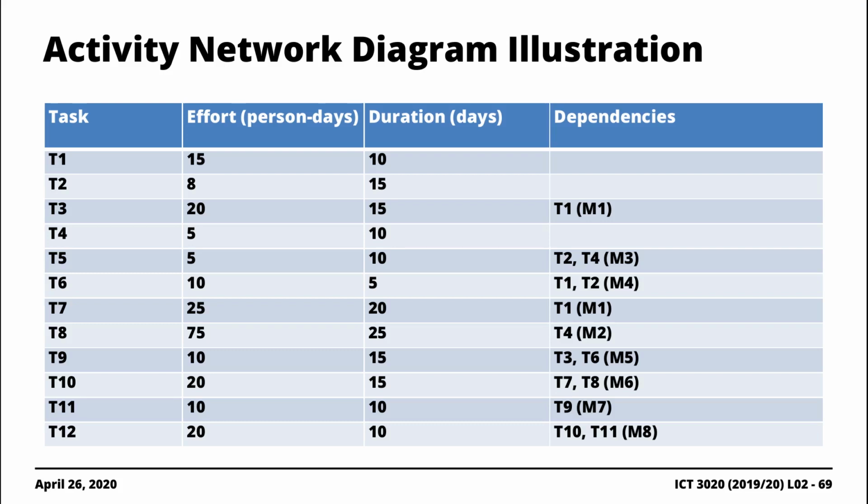So again, the input for the activity network is essentially your task IDs or the task names, the associated durations, and the dependencies that exist amongst the tasks. Remember that I mentioned that one of the very first things you're going to have to do is come up with the WBS or work breakdown structure. As you come up with the work breakdown structure, you come up with tasks, how long it's going to take for you to work on those tasks, and potential dependencies associated with the different tasks. That's all you need. So using these three different values or aspects, we can actually derive an activity network.